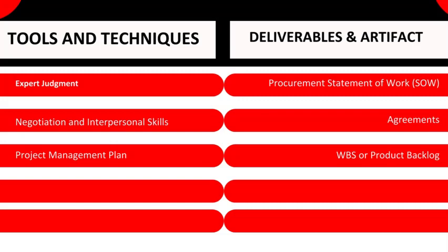Updated work breakdown structure, WBS, or product backlog. The new skill, resource, process, or asset must be integrated into current work, activities, or schedule. For example, a software development team is developing a new mobile app. The team has procured a software development tool license from a vendor.